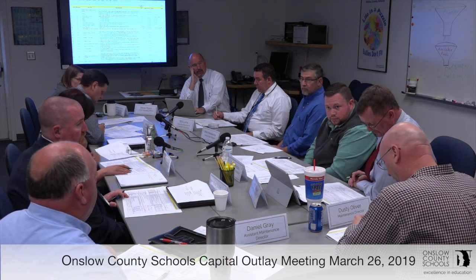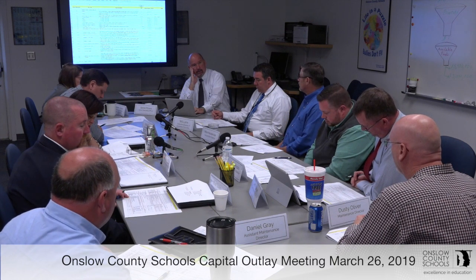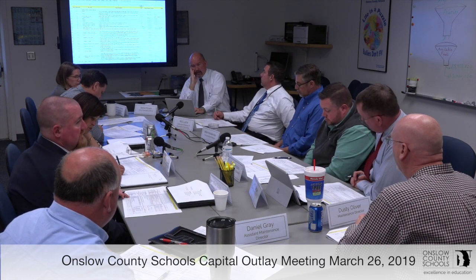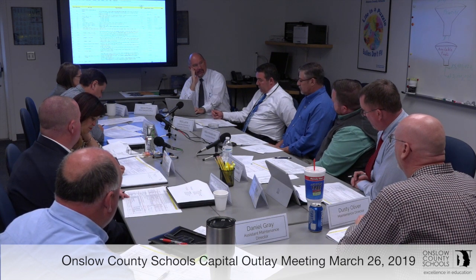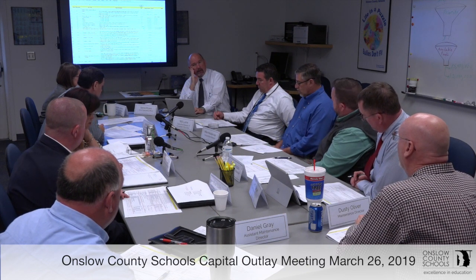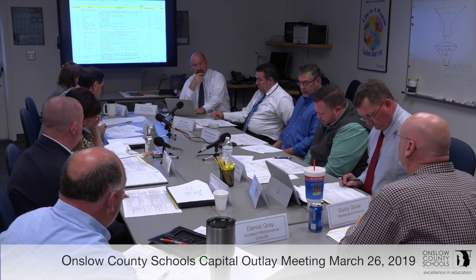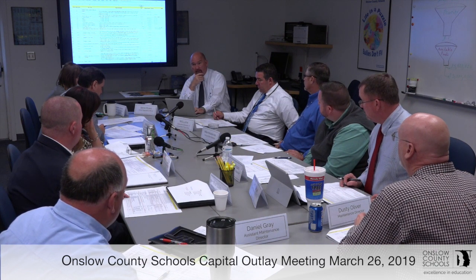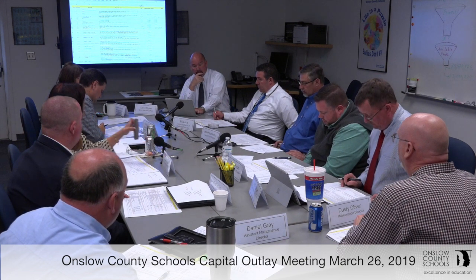But that $100,000 will not pay for it. I think we've had estimates of $800,000 in the past, because it's going to take some heavy equipment. I think the last estimate we had was for 6 to 10 years out at $250,000, give or take. So it probably costs that much just to tear it down. It does need to be replaced. I think everybody's seen it before. It's an issue. So it's a three.